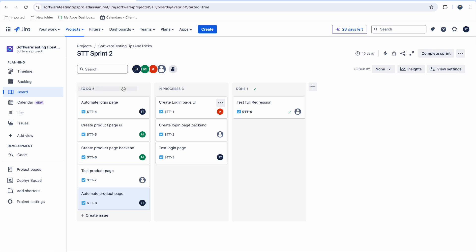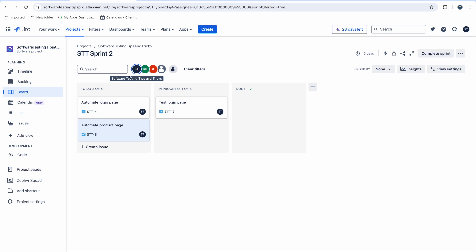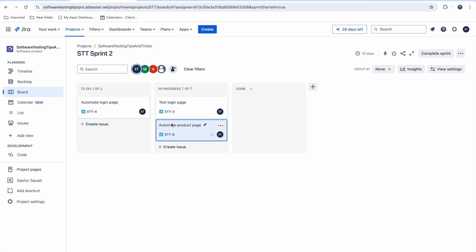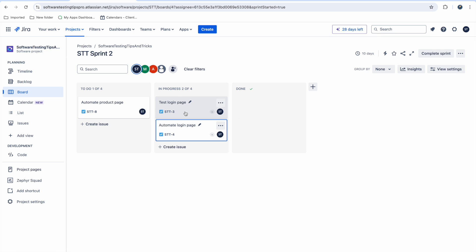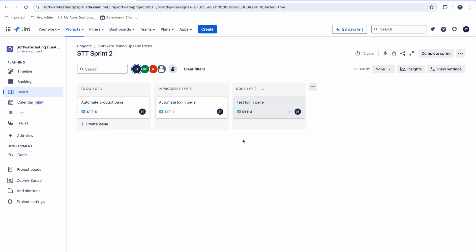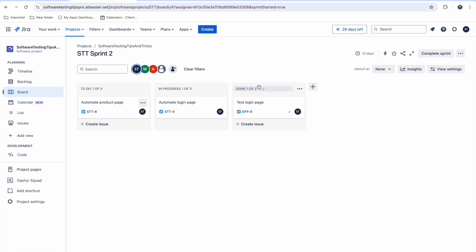In your daily scrum, you use the status filter. For example, the scrum master can select a team member and see only their issues. In this filter I can see I have three tasks — I started the login page, found a bug, and will start another issue today. Based on that we can drag and drop to change the progress. Automation I'm moving to 'In Progress', and if I'm done with the login page I can move it to 'Done'.